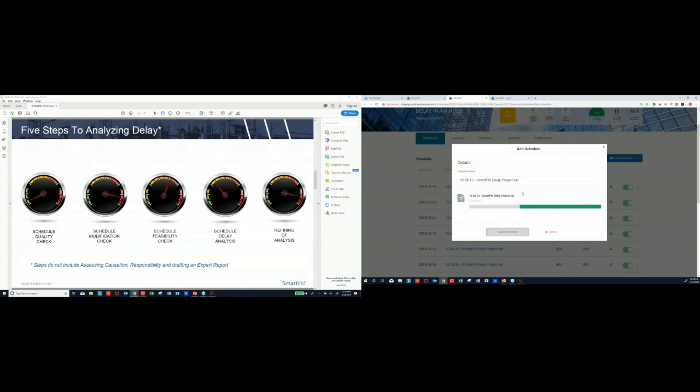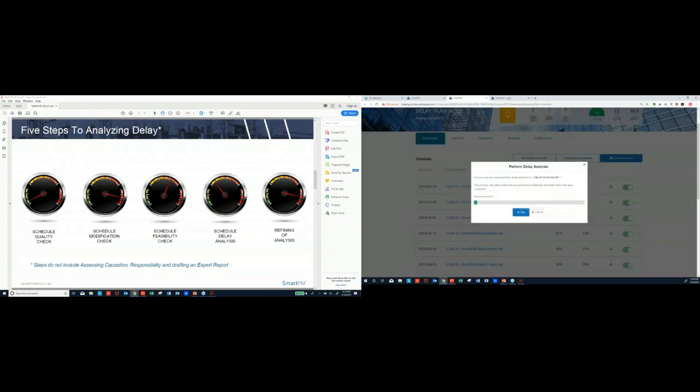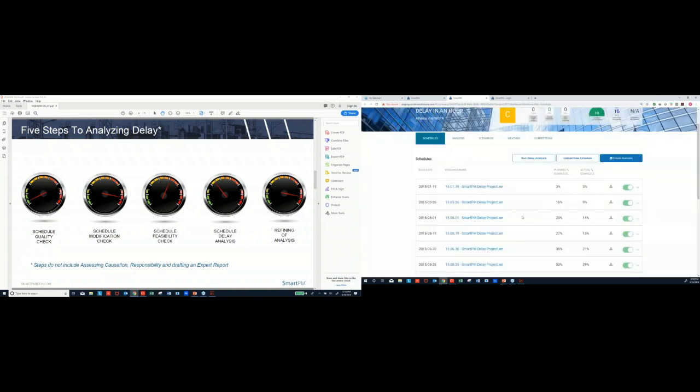Alongside that modification check, we need to always be looking at feasibility. One of the biggest challenges in construction is that decisions are made without analyzing the data beforehand. For instance, projects become delayed and end dates don't change. The reason that happens is because logic or durations were changed from update to update, meaning mitigation strategies were built in. This happens frequently in construction, and it needs to be understood. The decision-making processes need to be understood from update to update, because this plays into feasibility.